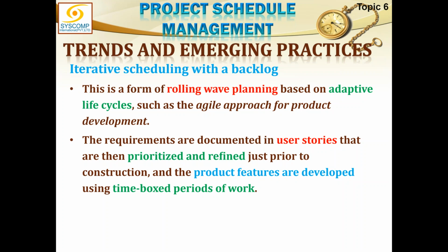So the top 3 tasks they pick up and they start doing them, and howsoever they can complete, they can complete all 3 of them, or they complete 2. That is not a problem. But at least these 3 tasks have been frozen and nobody can change them because they are under work.